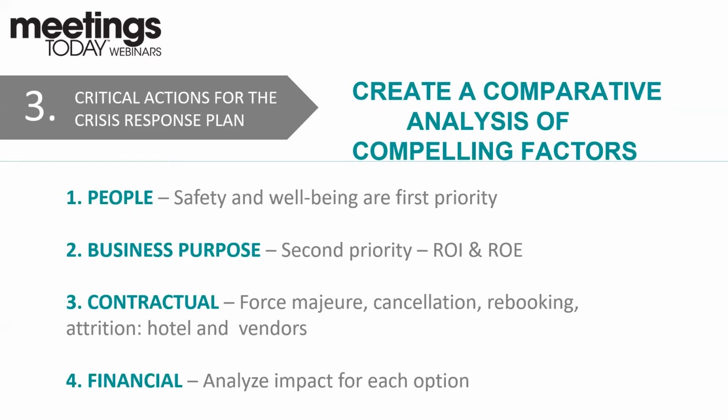There's negotiation going on. I listened yesterday to Michael Dominguez in his presentation in the ALHI recap of our current state. Where are we now? And he indicated that ALHI had rebooked over $20 million in hotel contracts for later times this year, and that he believed that most hotels that are not in the major cities like New York and San Francisco and Washington are allowing force majeure up to June. And if the virus takes its downturn and we go in the best direction that we would hope for in this next 2-month period, hotels will be enforcing their contracts after June. This is not my opinion, but it is one thing you have to prepare for.